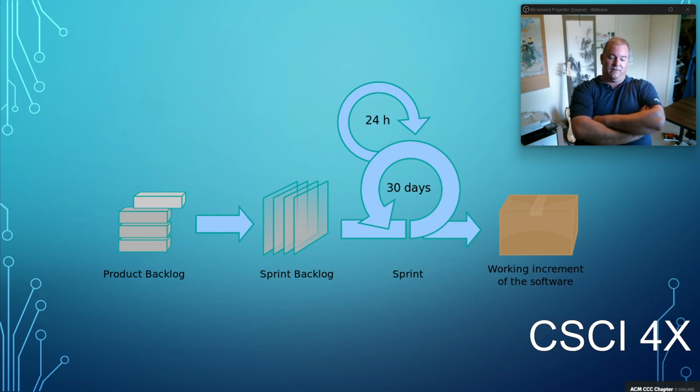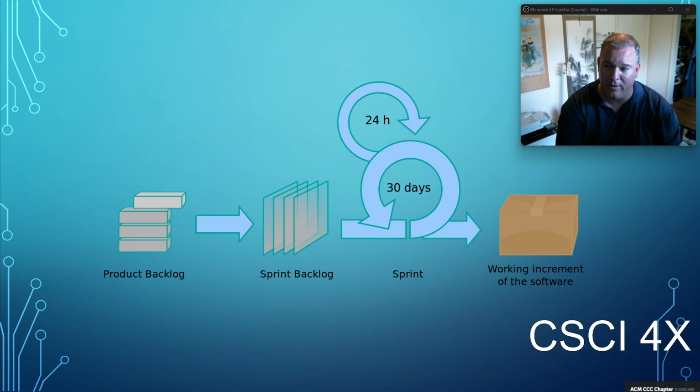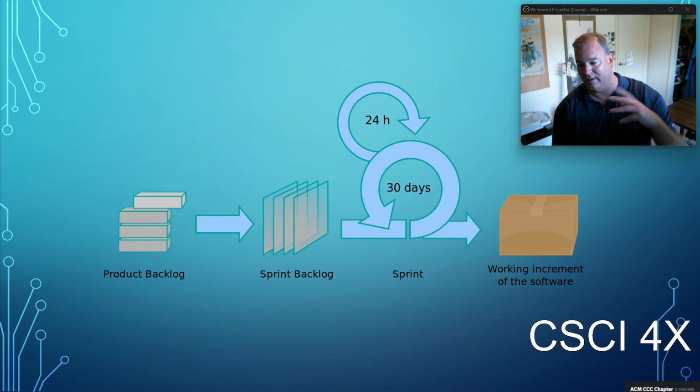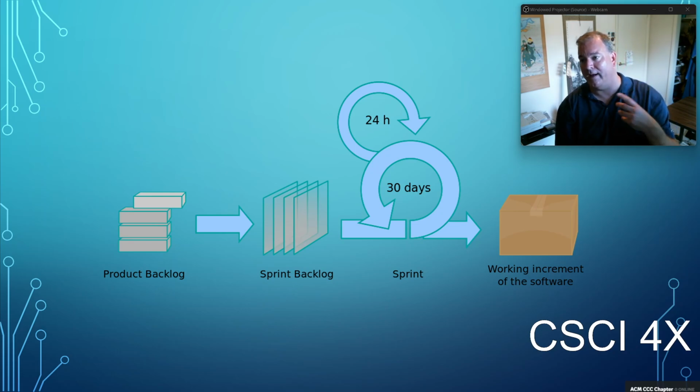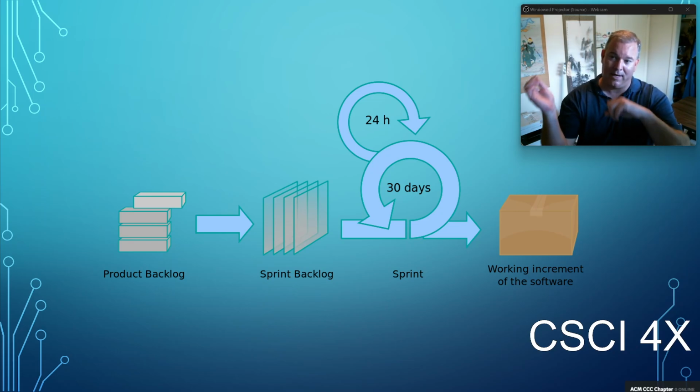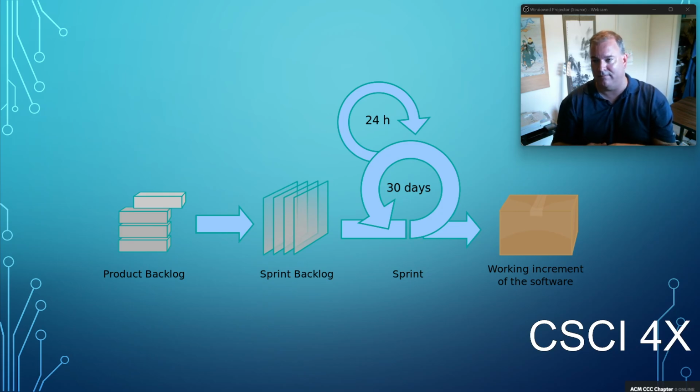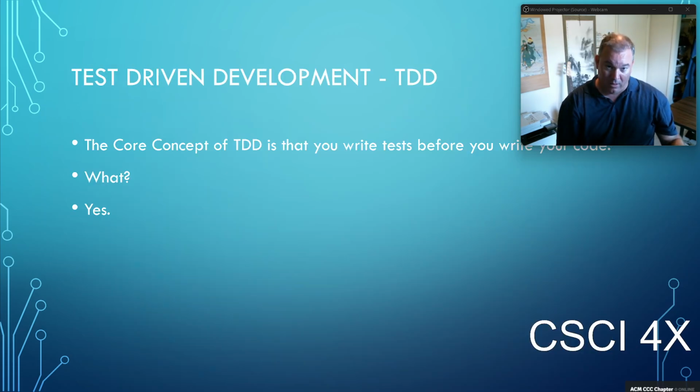Just depends what your release cadence is. You could have a month-long release schedule. So every month your client gets the latest and greatest version of your new air traffic control software. And then they can test it and look at it and give you feedback. I like the way this is going, but these buttons here, and when there's a thunderstorm, it should have a flashing, whatever. So they're always giving you feedback. And then the Scrum Lord will take that feedback and, for things that are good suggestions, at least, put them into the backlog. You can work through them again. Okay.